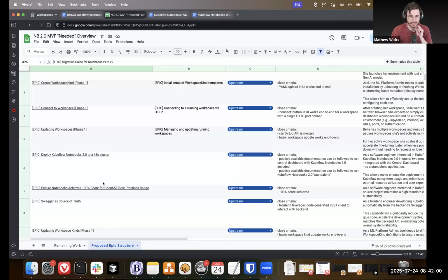Well, you can do it just literally by... We are thinking about this sequentially, it's just not codified. You can literally just create a roadmap on here, filter by epic, and then just give them a date. You could, I guess. I don't know. That might be a way to do it. I mean, timelines slip, obviously, but yeah.